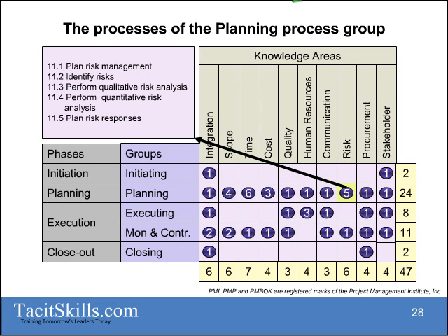And qualitative risk analysis means I'm going to say maybe high, medium or low, or red, green, yellow, whatever the case may be. Use something like that to identify the risks. Whereas if I'm looking at a quantitative risk analysis, I might say that there's a 10% probability that a certain risk can occur, and if it occurs, it might have a $10 million impact on my project.